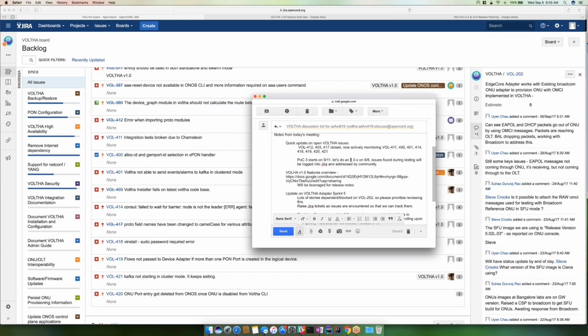Yep. So this isn't ideal, but it sounds like we'll want a 1.0.x by the end of the week, knowing that there are critical exceptions, because we have to get into the 9/11 testing. And then we'll maintain that branch and continue what we've been doing in terms of the bug scrubs and continuing to get fixes in. Does that work?